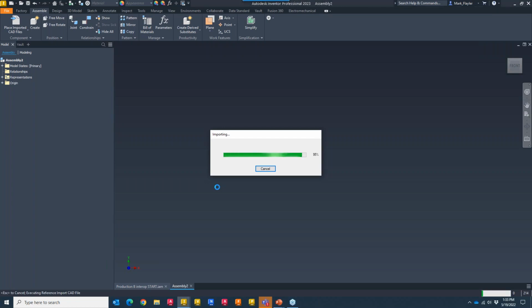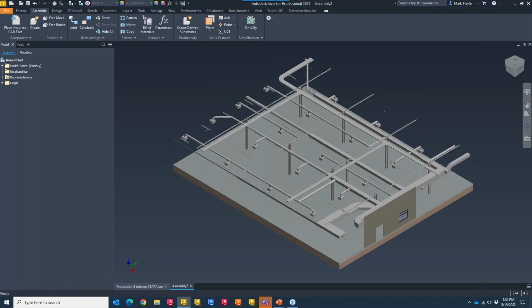Now, if I disagree with that, I can go back to the construction cloud. We can have conversations in there and say, I really need to see these doors because I'm not sure my equipment can fit through there. So we can actually do some sessions with markups and pre-planning for a brownfield to make sure that my stuff can actually fit through the door, so I don't have to cut a wider hole. Okay, so there's my data exchange brought in.